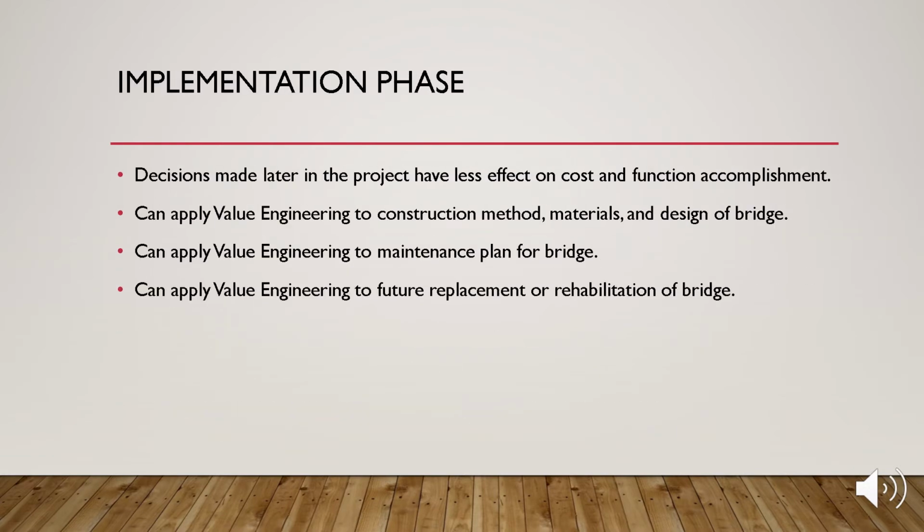Now, once you've been through the presentation phase and the government has chosen an idea or a path forward, we enter into the implementation phase. And in this phase, the process of value engineering can be used to save on construction, materials, design, maintenance, replacement, rehabilitation, all of these things if the government so chooses. But again, decisions made later in the project have less effect on cost and function accomplishment.